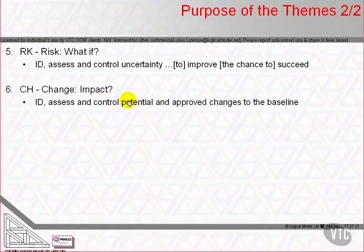Sixth is the change theme. The change theme describes how PRINCE2 assesses and acts on issues which may impact on any aspects of the project's baseline of agreed plans and completed products. In PRINCE2, issues may be any of unanticipated general problems, requests for change, instances of quality failure, or questions raised by anyone at any time.